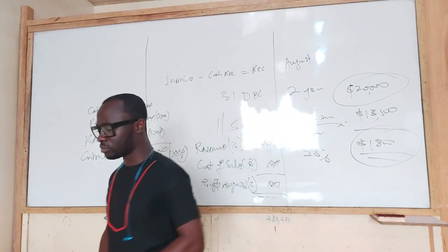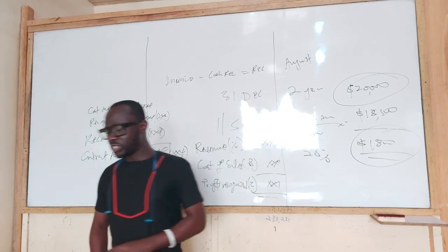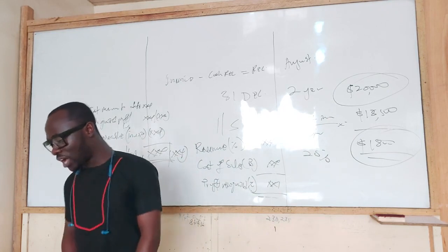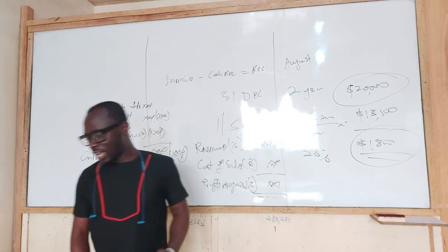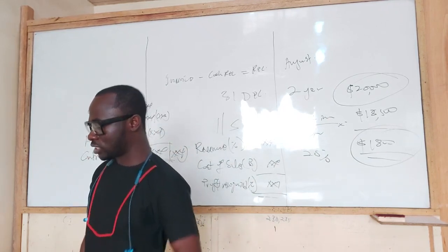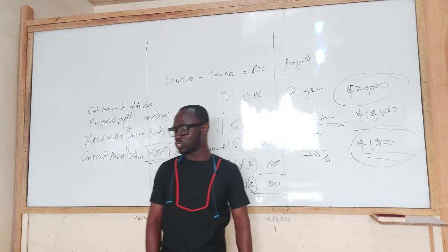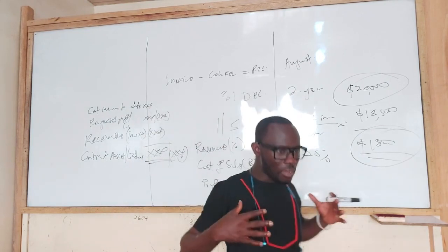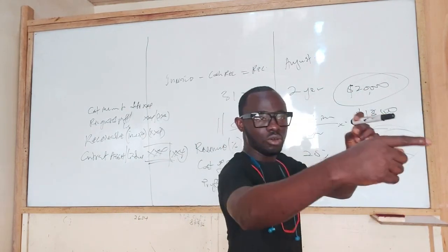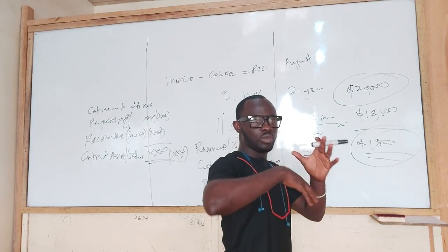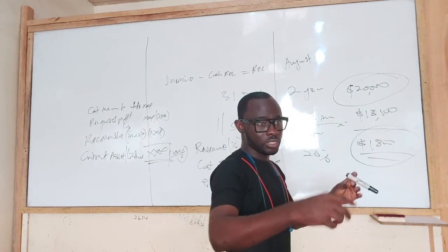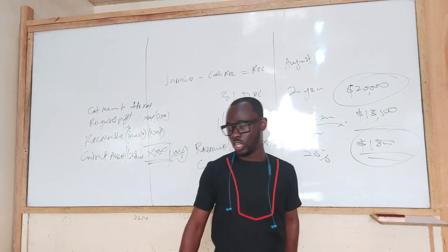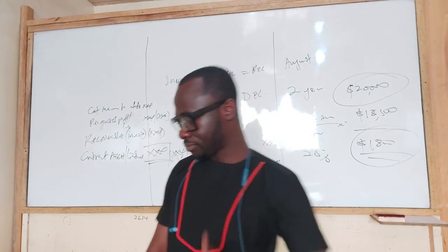So a cost plus or cost-based contract is a contract in which the contractor is reimbursed for allowable or otherwise defined costs, and in the case of a commercially based contract, an additional percentage of these costs or a fixed fee, if any. So whatever money you spend, we're going to be reimbursing you. But if it is going to be for a commercial purpose, then we are going to provide you additional money. That is going to be our profit in relation to that.